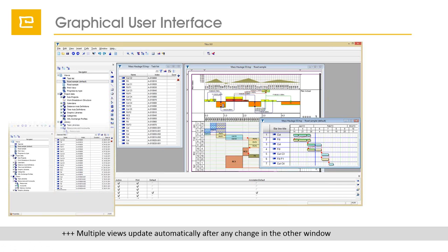We can open the application multiple times and copy data by drag and drop from one project to the other. For example, one usage is that we copy complete sub-projects from part plans into one central plan in order to see the overall situation in the project.